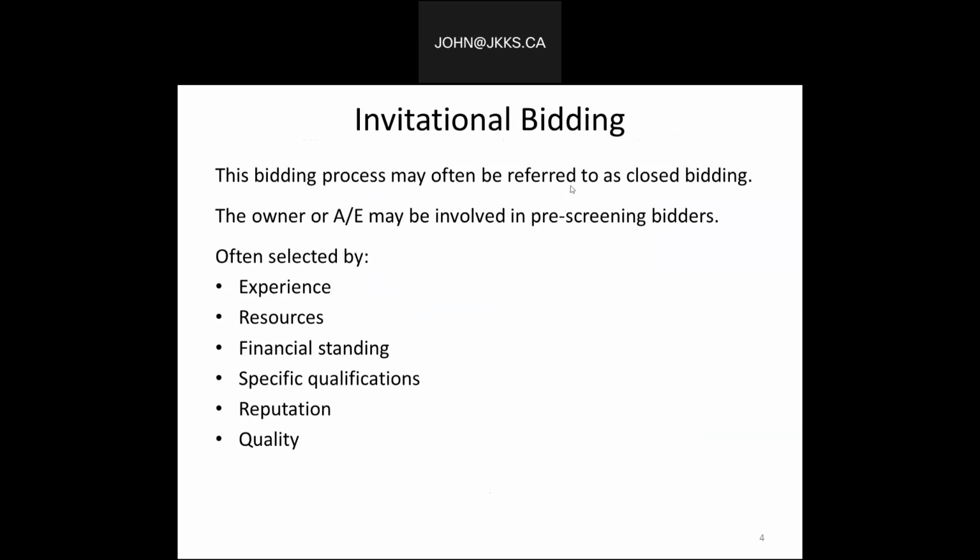Let's talk a little bit about the invitation for bidding. The bidding process may often be referred to as closed bidding. The owner or the architect or engineer rather may be involved in a pre-screening of bidders. They could be selected by a number of different factors, such as experience, resources, financial standing, specific qualifications, the contractor's reputation, and/or the quality of work that they actually perform.